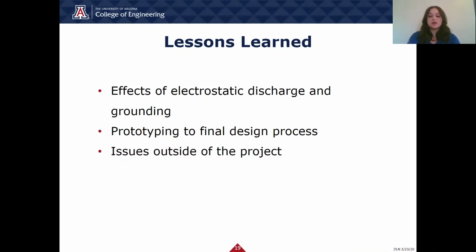However, once we integrated all the components, we began to encounter some issues. Since our design wasn't properly grounded and we didn't build our prototype in a proper lab setting with electric discharge mats and ground plates, the microcontroller and FTC 1004 chip were subject to electrostatic discharge, which rendered them non-functional. In the future, we would incorporate a grounding scheme into our design to eliminate this issue.